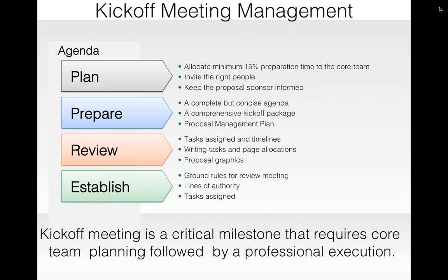So you need to set those standards and establish the ground rules specifically for the review meetings: what will be reviewed, how it will be reviewed, how the review comments will be passed back to the proposal development teams, and how those changes have to be implemented, how the new versions have to be uploaded. All these ground rules you need to define and establish in your kickoff meeting.